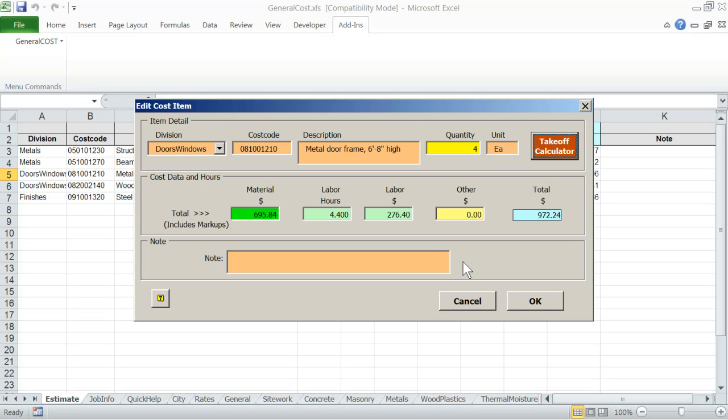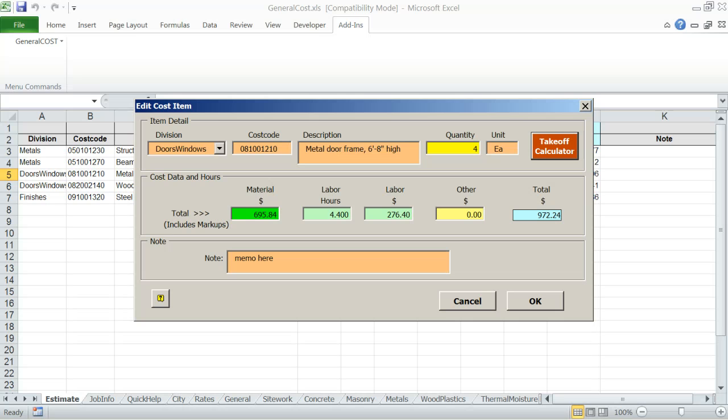By the way, general cost estimator works well with rolling takeoff devices such as ScaleMaster and ScaleX when they are attached to the computer. Rolling the device on the plan will calculate distances, areas, etc. Note that when the quantity is changed, the cost category totals are accurately extended. You do not need to do any calculations yourself. You can add some memo notes if you wish. Click OK and general cost will update the estimate worksheet data with your takeoff quantity edits.